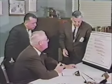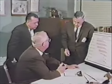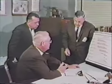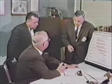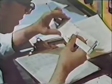Well, now, Frank, you know this center wing section has to have a specially built car from the rails up. Right. And it's going to take about 12 months to produce that car and have it ready for shipment. I believe we can do it in 12. You think we'd do it in 10, Bill, if we had to? From nose to tail, there were new design problems to solve.